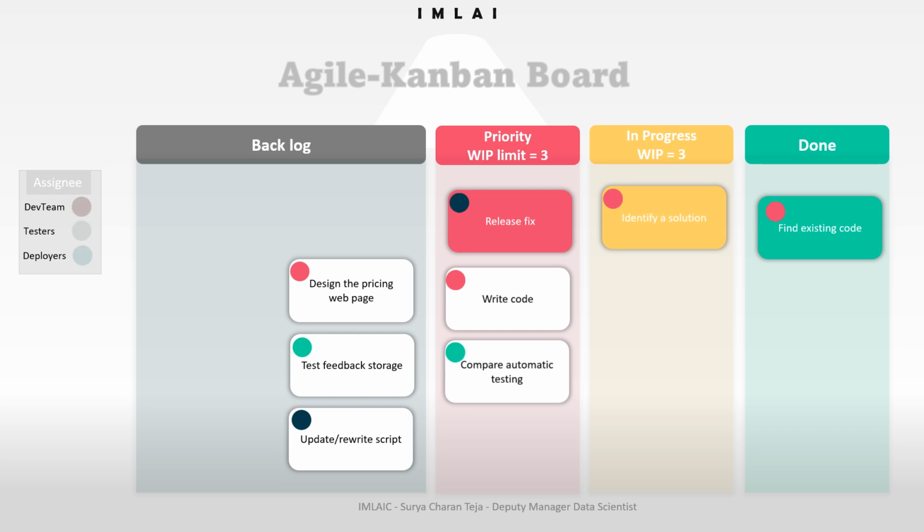That's all the pitfall with the Scrum board. In Scrum board, we just monitor the things, but we are not making sure that it has to be completed. Here the Kanban methodology makes sure that you select the priority tasks, you finish it. Once it is moved from priority section to in progress, then only another task can come there. That means we are literally making sure that the tasks have to be completed, have to be finished.